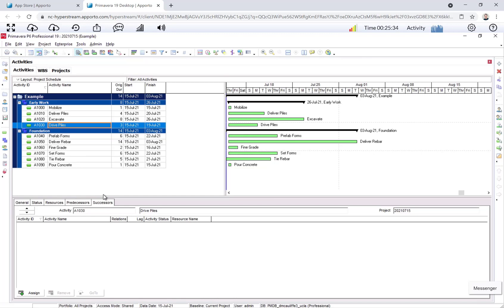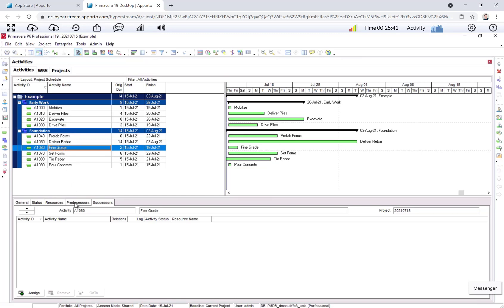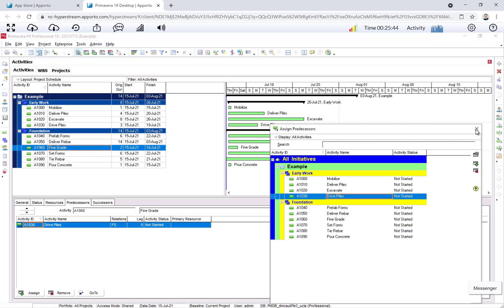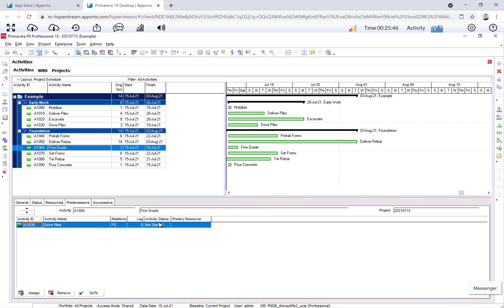Okay, next up, fine grade. Fine grade, we have one predecessor, which is drive piles. So predecessors, assign, drive piles. Finish to start, good.